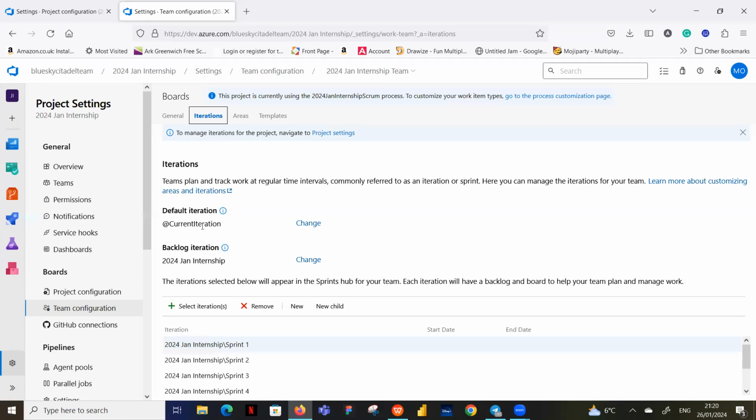Let's assume we leave it here, we don't change anything, and the BAs are creating stories on the backlog, it just automatically goes into your sprint. So you'll see a situation where you've just taken, let's say, 5 stories into the sprint, and then you start seeing more stories. Your stories are becoming 10, and you're wondering, what happened? We committed to 5 stories. Why is it turning to 10?